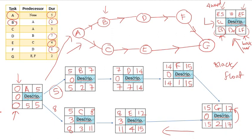One important thing here is that we have to make sure that there is no slack in our critical path. So our critical path is A, B, D, F, G. So the slack are all 0. There is no slack.